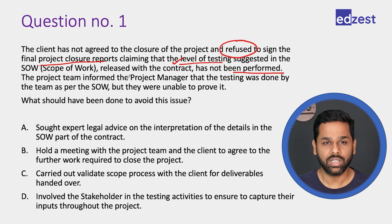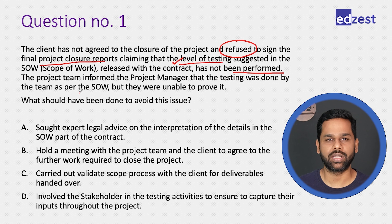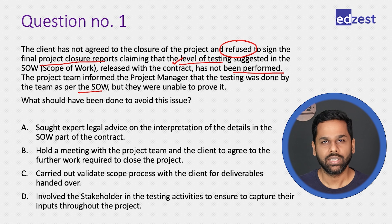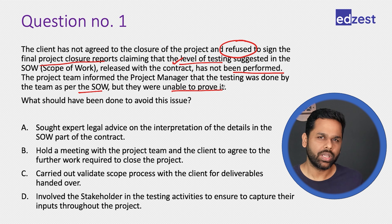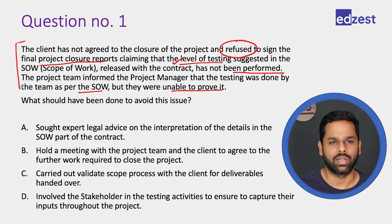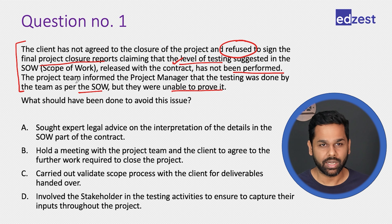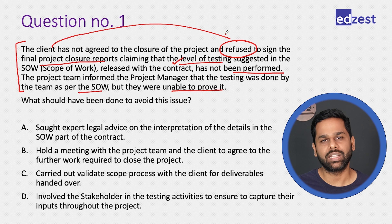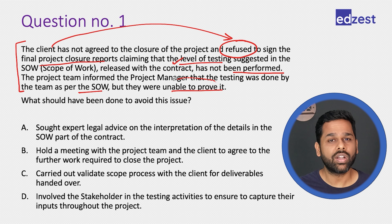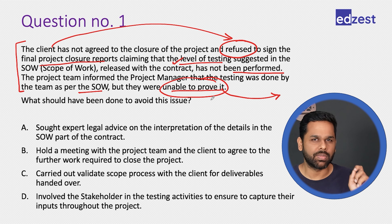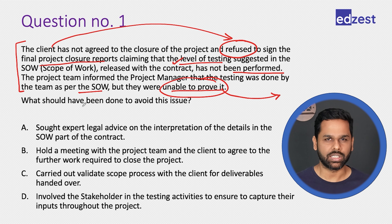The project team informed the project manager that the testing was done as per the SOW, but they were unable to prove it. This question talks about a situation where the client is not signing the project closure report. The team could do it but were not able to prove it — something is missing on the proving part. What should have been done to avoid this issue?